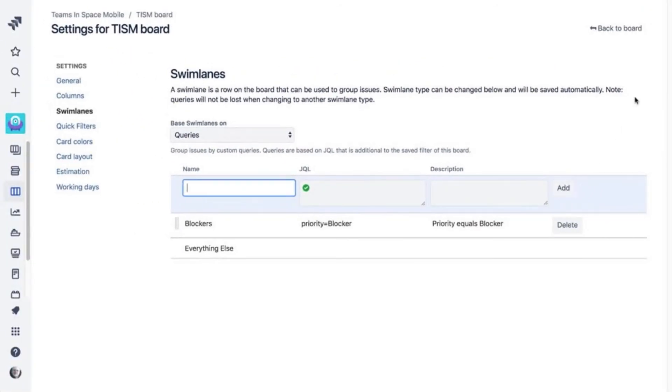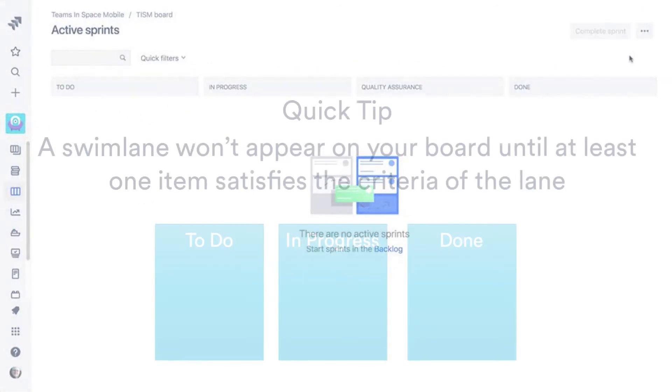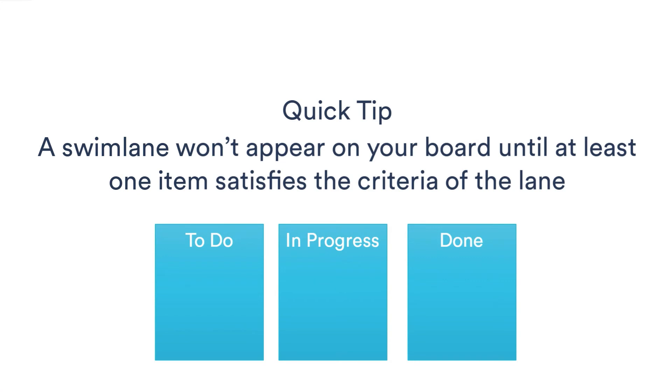Here's a tip. Don't get confused if you don't see a swim lane that you know should be there. Swim lanes don't show on the board until there's at least one issue that satisfies the criteria of the swim lane.